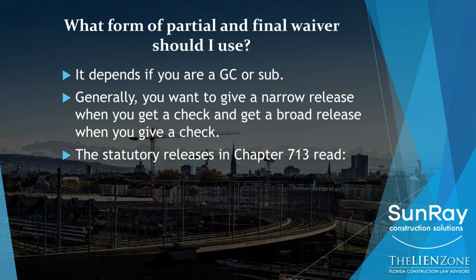Generally speaking, you want to give a narrow release when you get a check. So when someone's handing you a check and you're going to give them a release, you'd like that release to release the fewest number of rights possible so that you preserve the greatest number of rights possible. Now, the converse is true. If you are giving a check to somebody and you want them to give you a release, you want them to release anything and everything under the sun so you don't have to worry about any issue showing up later in the course of the construction project.